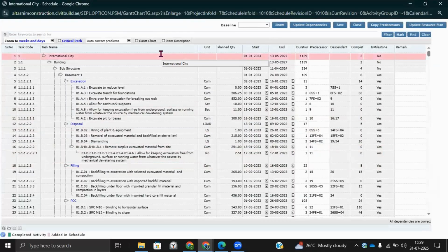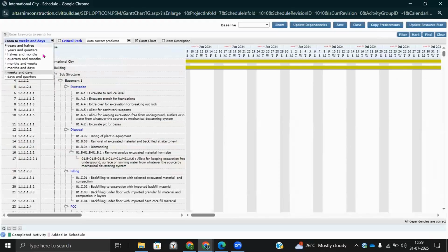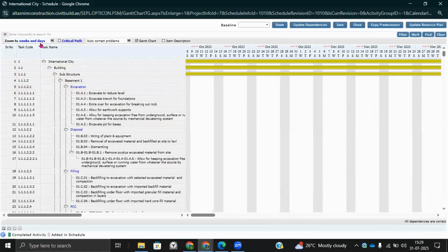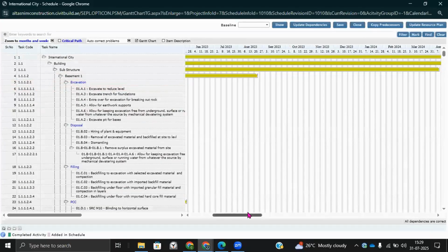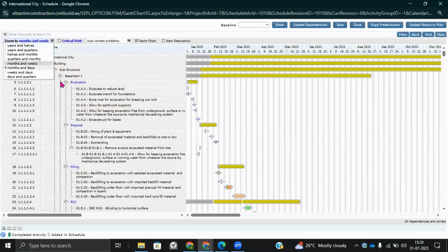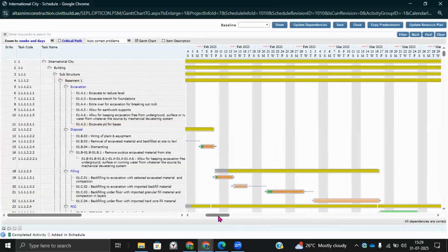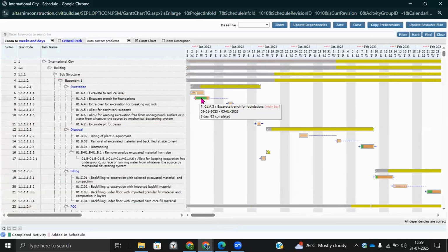What CivitBUILD additionally offers you is a dynamically generated Gantt chart, which is directly linked to your project execution. So let's say my site team is executing the project, and on a daily basis, they are adding the daily field report from the site. So what the project monitoring department or planning, let's say a project manager, gets is detailed information related to project progress on the site. This Gantt chart is not only showing you the dependency, start and end date, but the progress of an activity itself and what is the impact of that completion over the project.